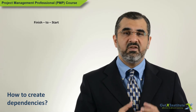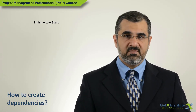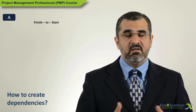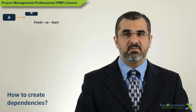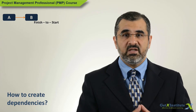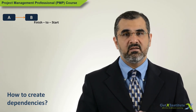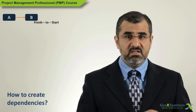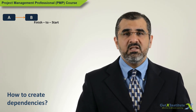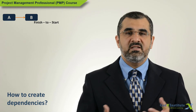When the predecessor activity finishes, then the successor activity starts. So in the example, when activity A is done, then activity B starts. If activity A is late, the start of activity B will also be late because it cannot start until A is done. This relationship is so common that it is not even identified on the schedule, and in the absence of any other relationship, it is assumed that this is the relationship.